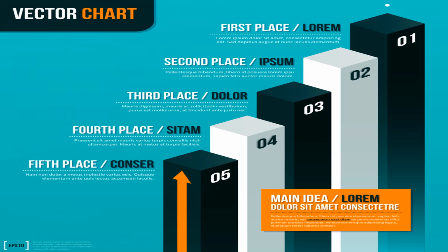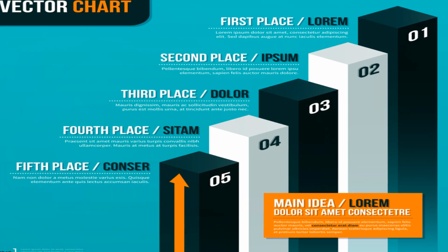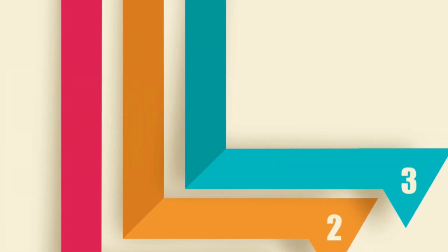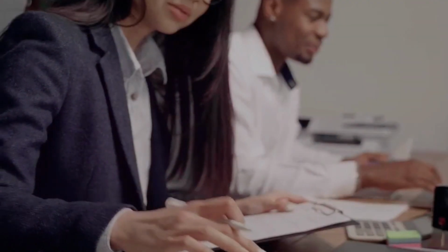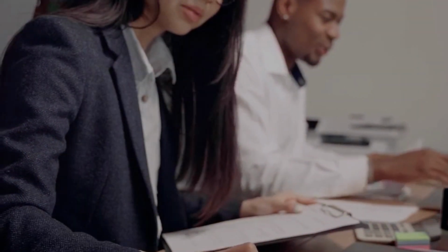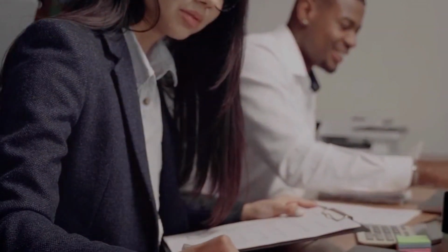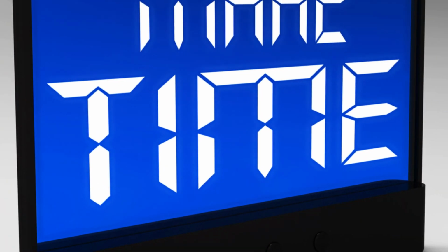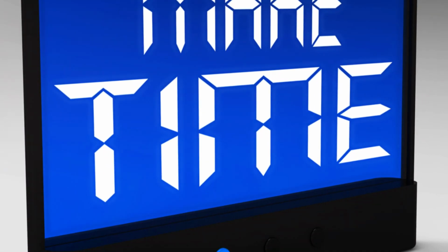Begin by identifying which tasks rely on the completion of others. This establishes the sequence of activities in your project. Second, determine early start and finish dates. For each task, determine the earliest possible start and finish dates. This involves considering the task duration and any dependencies on preceding tasks.